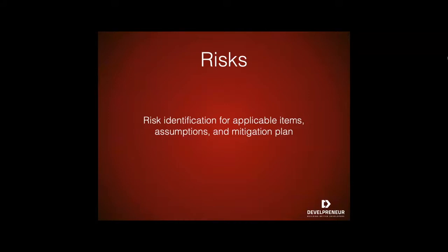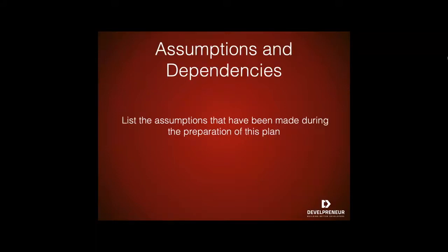So you have to make sure that you consider these scenarios. You don't want to run into a situation where a lot of companies do, where they hire all the resources they need to develop the software, or they contract out to get the software developed, but they wait till the very last minute to get a team in place to actually test the software. That's a huge risk. So you need to make sure all that's identified now before you get to the phase of testing.